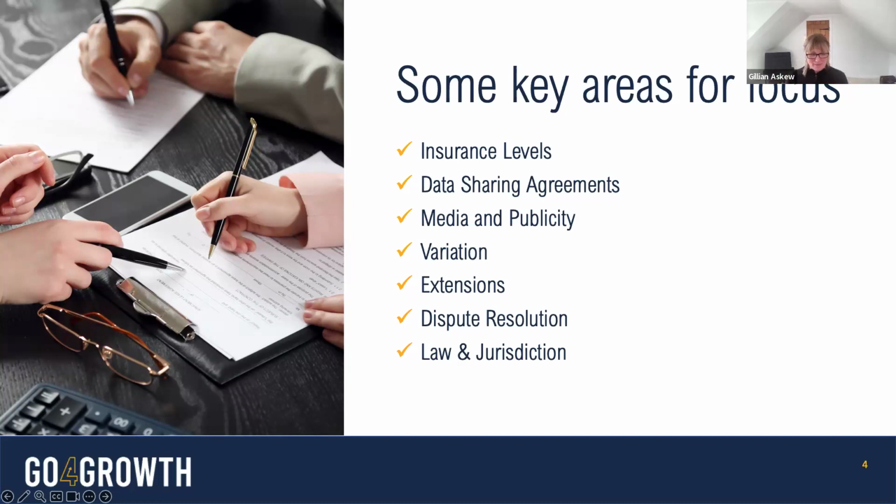And the way I tend to think about it is, if I make that change, would I have been letting a different contract? Would different bidders have taken part? So if a variation to a contract changes the contract value substantially, then it might have got more or less attention. Who knows? So there is that materiality element to it. Any variation process should be transparent to you. If the client is asking for a variation, you should be given time to consider that and to respond to that.